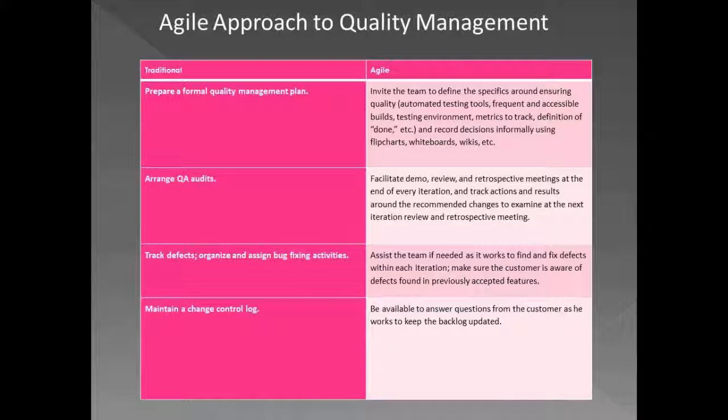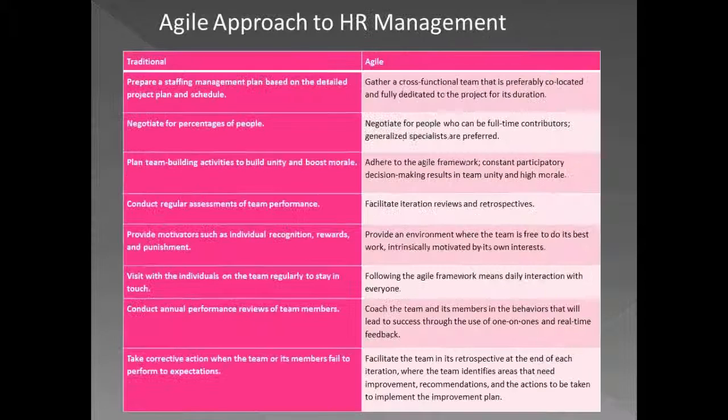So I think we pretty much do quality control in Agile as well, as we do in any project. In the case of Agile, as in the case of PMBOK, we monitor the quality using various tools. For Agile, whatever metrics we have agreed, such as burn down charts, we do root cause analysis on why we are not progressing at the desired velocity, and try to overcome this in the next iteration. So this is about quality management.